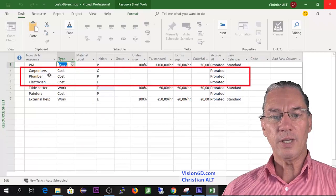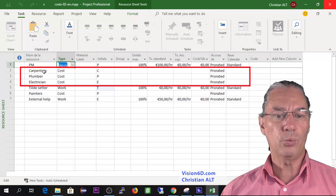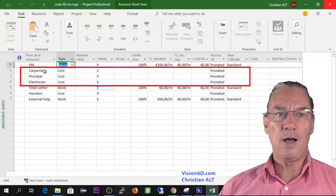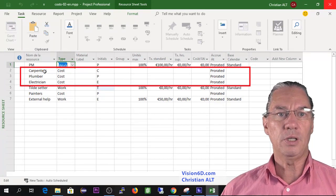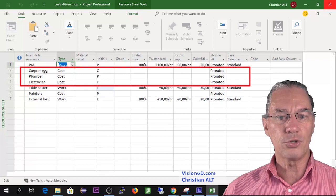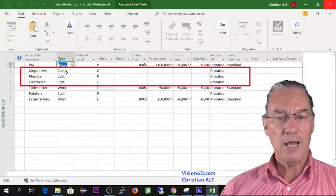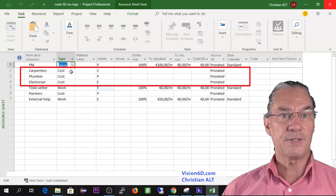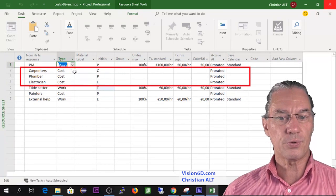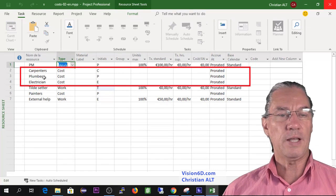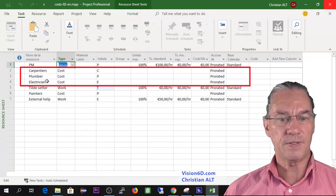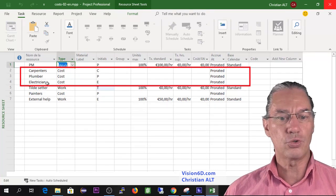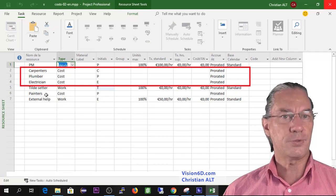We have carpenters that will work. Since carpenters have made me flat rates for the project, they will be considered as cost resources here, as well as the plumber, the electrician, and the painters.